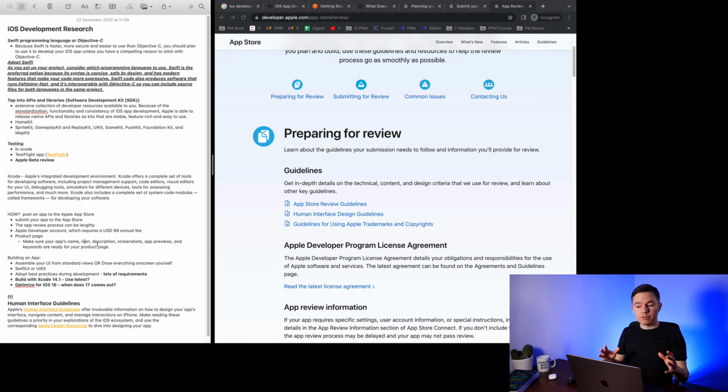Okay, here's what I found during this quick review. First of all, I was correct. We will have to spend extra effort to get the application to the App Store. It's not about just sending it for approval. We also need to create a product page, which requires some descriptions, screenshots, previews, keywords, and stuff like that. So someone will have to design all of that.